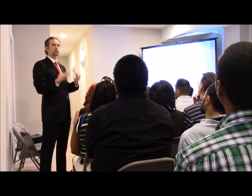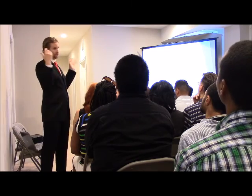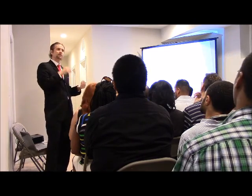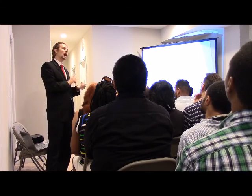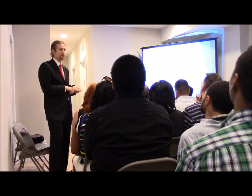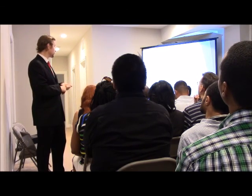Once you get a good crew of guys, they can work pretty much on top of each other, meaning some guys can be working simultaneously. Sometimes it's not going to work so well. I would prefer that you have the HVAC first before you have the plumber come in. Then you get the rough HVAC inspection.